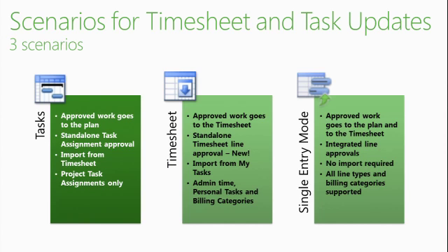Second mode is the timesheet view. So why these two different views? It's because you have two different types of data that are entered. So in a previous version of the system, 2007, we actually had two different screens that were not linked in any way with each other and that required a double entry if you were using both timesheet and task update. So in the timesheet, you basically enter your time against tasks or against non-project activities as well.